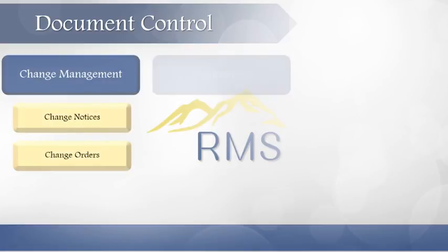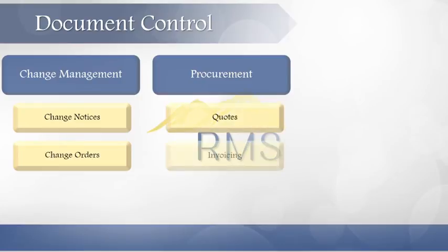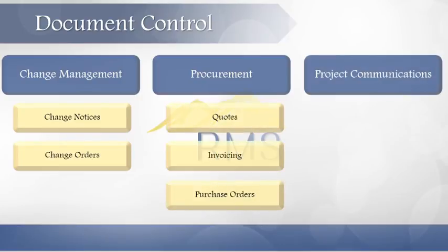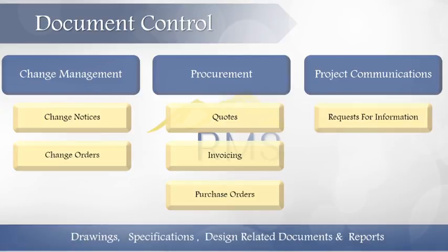Every project needs to maintain documentation for legal, construction, and historical reasons. Change management requires creating change notices and change orders. Procurement requires saving quotes, invoicing, and purchase orders. Project communications in the form of requests for information need to be created for distribution.